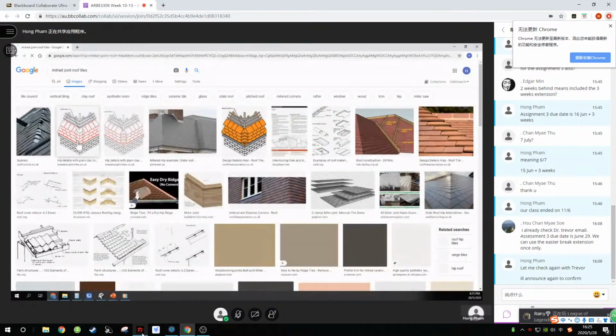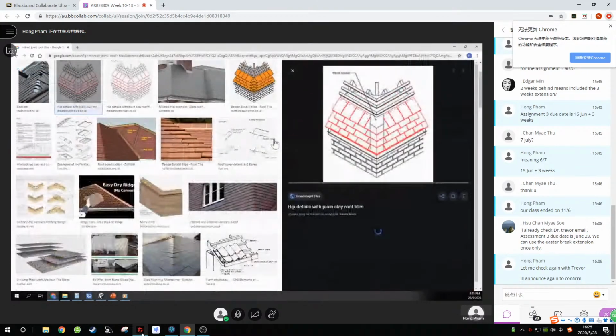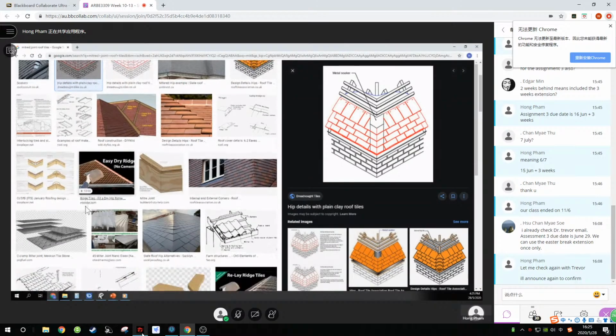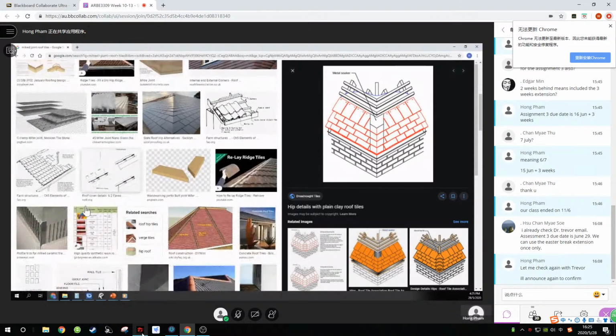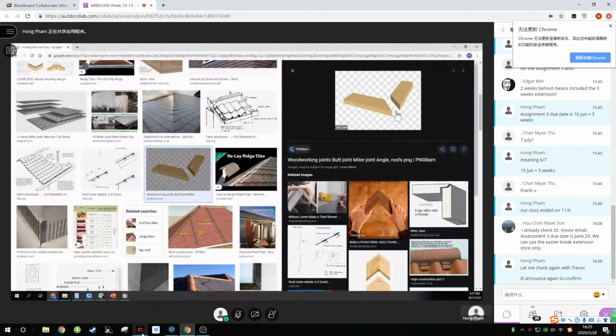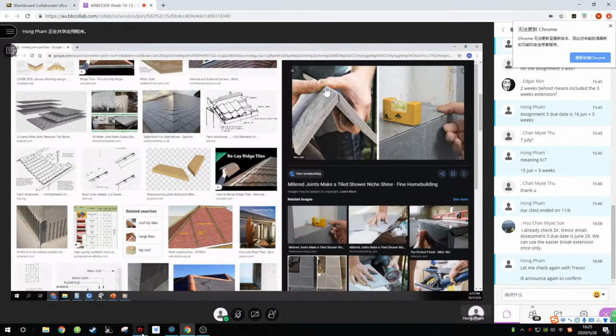Jollied tiles means you get the saw and you miter both edges of those tiles so the tiles come together with a mitered edge on the corner. This one is a mitre joint. That's what jollied means. So if you hear jollied tiles or jollied valleys, they're fairly expensive items to get done. You measure them by millimeters, and it's where the two tiles, roof tiles or wall tiles, are mitered together. Very difficult to have these gap joints.